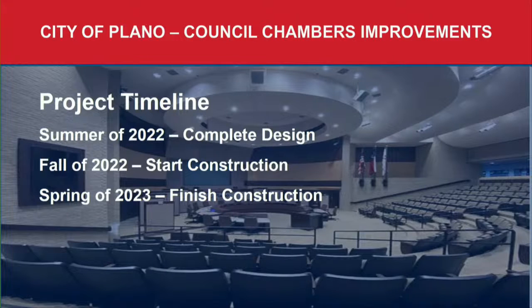We are really taking our time with this design, trying to get as many thoughts and opinions as possible, make sure we address every issue we can identify. For that reason, we think we're going to take till about the summer of 2022 to complete the design. With that completed design, we would hope to start construction in the fall of 2022. And we hope to finish construction in the spring of 2023.